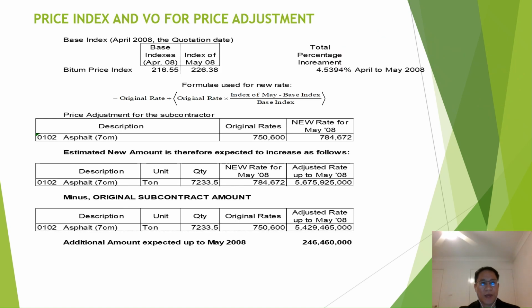So another application of price index is for price adjustment of VO, variation orders. Let's say the subcontract agreements allow the price adjustment for some items of road work, which stipulates that the new rate will be based on the price index of the current and base months.